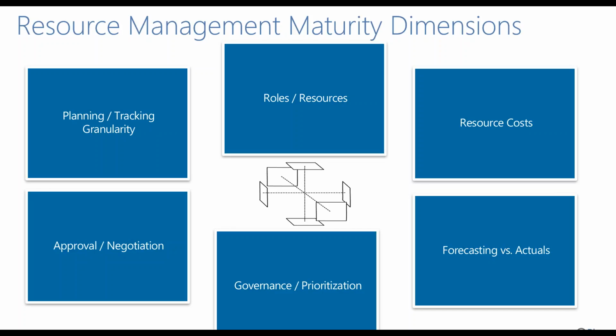Are we just going to forecast resources, basically planning and looking ahead and continually adjusting that forecast so we have a rolling picture of what we think we're going to be doing? Or do we want to compare that with actuals that we're capturing from the people on the ground, closest to the work, and collect things like timesheets, so that we can see what the burn is and what we're actually spending time on, and compare that against what we thought we were going to do by the forecast.